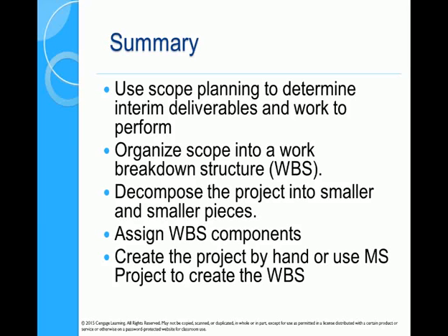We then looked at work breakdown structure, which takes the whole project and chunks it down into smaller manageable parts. The process of creating a work breakdown structure is a decomposition. Where do you stop? You stop when you have a work package. How do you have a work package? Well, you meet some of these requirements. One is only one person is assigned to it. The other is there must be sufficient detail for the person who has been assigned responsibility to understand what is required to be done. No more than that.